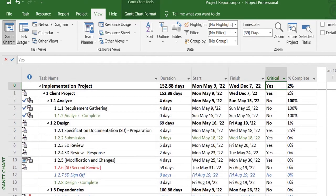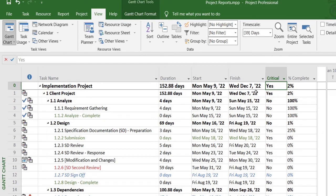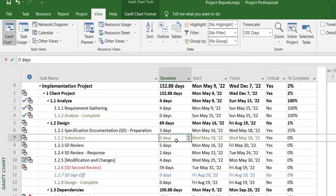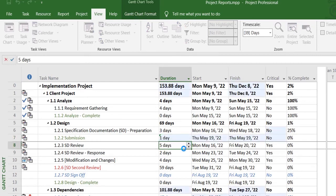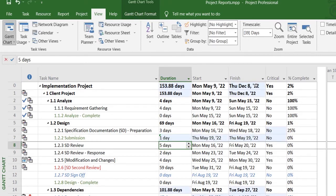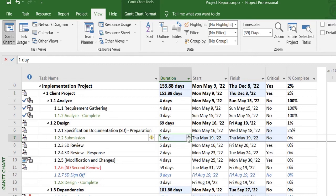And just to test out our theory, my project end date right now is seventh of December. So if I change the duration of this task to one day, you'll see it directly impacts the end date or finish date of my project. So that's what the definition of a critical task is.